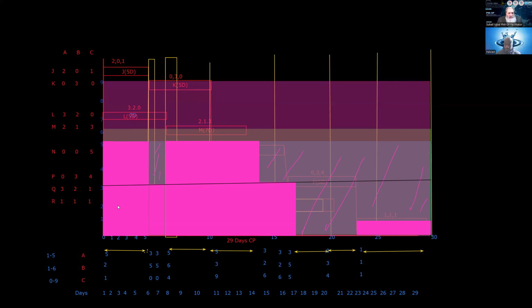So this is the requirement only for a couple of days that I need 5 people. So I cut that requirement. This is called resource leveling. I have leveled these resources, thus causing my critical path a little damage. I have increased the duration, but at what cost? I have been paying them unnecessarily for such a huge period. I have saved all this money, this money, this money. I have saved it all.